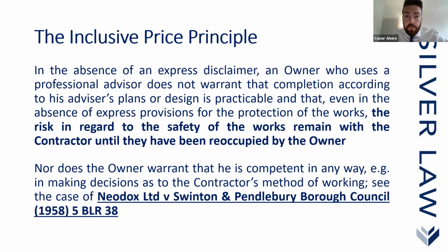Okay, in the absence of an express disclaimer, an owner who uses a professional advisor does not warrant that completion according to his advisor's plans of design is practicable, and even in the absence of express provisions for the protection of the works, the risk in regard to the safety of the works remains with the contractor until such time as they have been reoccupied by the owner. So again, unless the contractor has adequately reserved a position, even the protection of the works, the responsibility will be retained by the contractor.